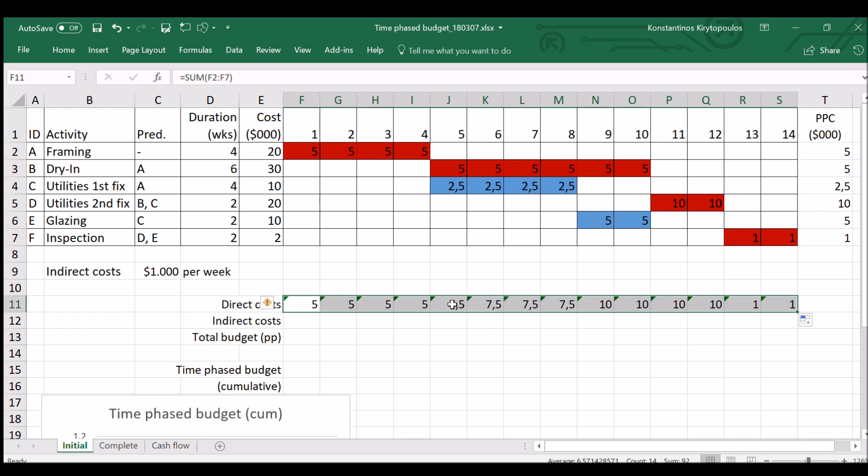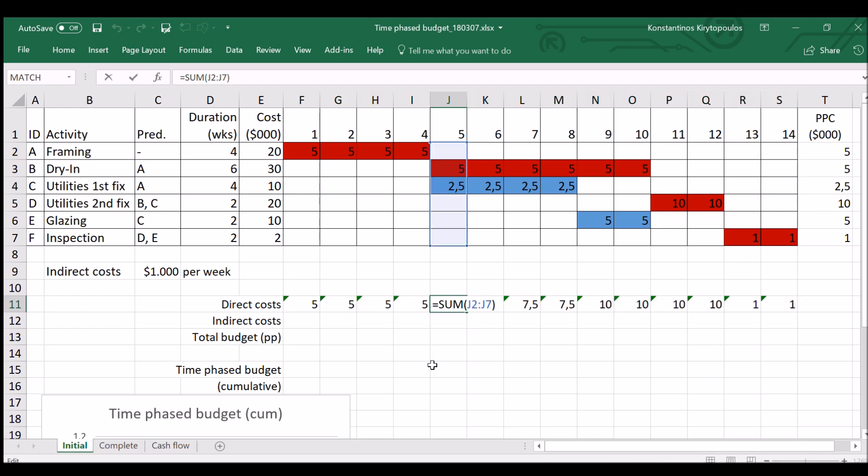And if we do this for all the weeks, we come up here and we see, for instance, on week five, we have both activities B and C happening. $5,000 from activity B and $2,500 from activity C. That makes a sum of $7,500 in week five.